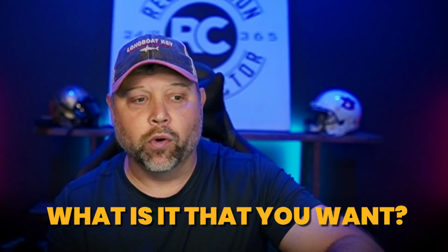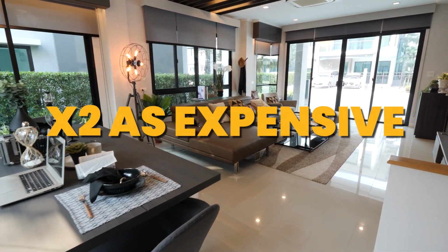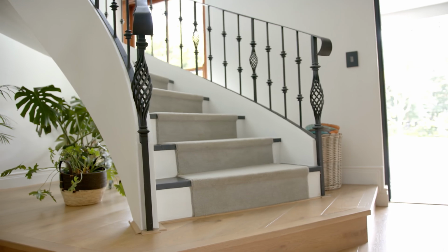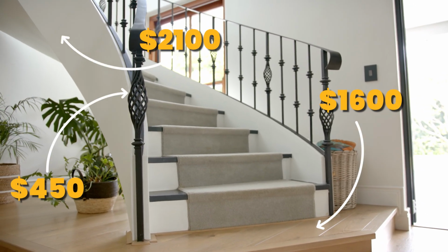You can't just say, we'll give you a credit towards something else without having it picked out. That's a big mistake because you haven't seen what they picked out. Let's say you try to do this credit for the upgrade, and they haven't picked the upgrade. What if they pick something that is twice as expensive as what you thought? Well, that doesn't work. That blows your budget. So if you're going to do an upgrade, you've got to find out what it is that they want. You need to know how much that's going to cost. It has to be defined up front, okay? Now, let's say that they've got level 1 flooring and they want level 2 flooring.